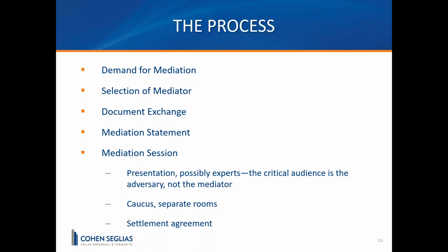And then prior to the mediation, the mediator will typically require mediation statements. They can be confidential, meaning that they are only being sent to the mediator, or they can be exchanged between the parties. I have to tell you that in my experience, it's much better to have them exchanged among the parties because you want to see where they're going from the beginning. But that doesn't mean that you can't also have a confidential communication with the mediator that discloses to them some of the hurdles that you see with the parties coming to a resolution.